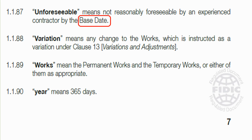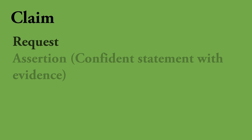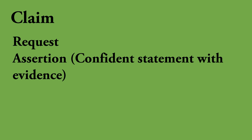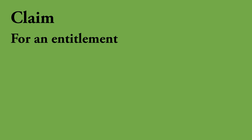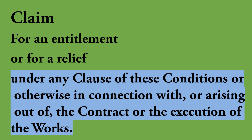Now we'll move on to the next definition: 'claim'. This is a very popular term in the construction industry. A claim can be defined as a request or an assertion — a confident statement with evidence — from either party of the contract to the other, for an entitlement. If you are the contractor, this could be for additional payment or an extension of time; if you are the employer, a cost reduction. You can also submit a claim for a relief, such as relief from delay damages or some kind of penalty. You can initiate a claim under various circumstances as described in this document, and we will discuss those under the relevant clauses.